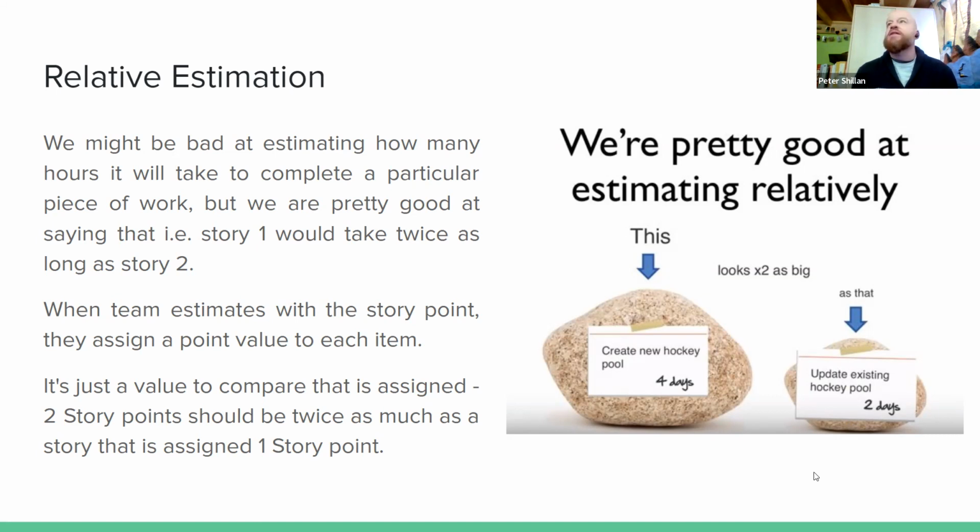So for example, there's a good example here that looks quite good, but in a coding sense, what a lot of teams will try and do is think about what their smallest piece of work is. So you might decide, for example, the smallest thing we do is maybe a 1-line change in a config file and making sure that that's worked correctly, or changing a font color in a theme, or something small, and that can be a baseline for a point.